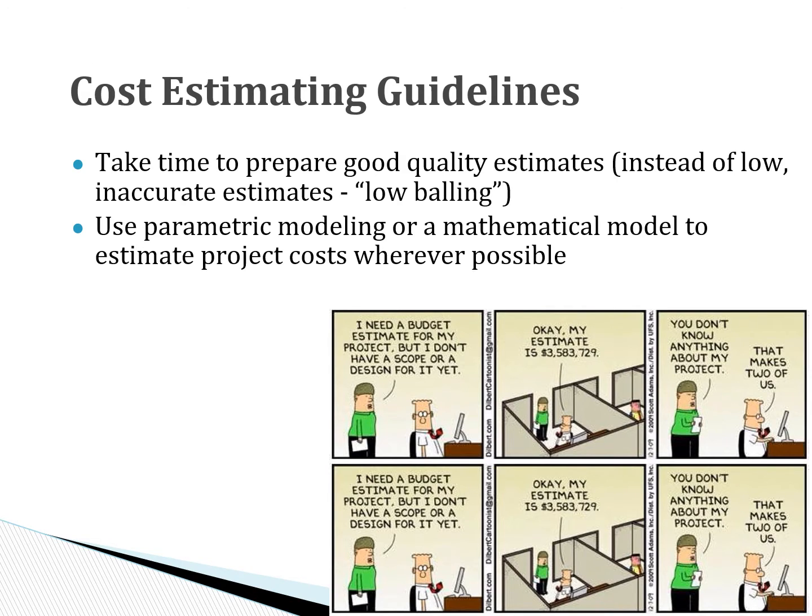Another thing to keep in mind is that parametric estimating is an effective way to estimate a project based on similar projects. For example, if I figure that I can cover 3 knowledge areas in one lecture, then I can estimate that if I have to cover 22 knowledge areas, then it would take me 7 or 8 lectures to cover all of them. So this is parametric. So I'm using the information about the smaller effort and extrapolating it to estimate the overall effort.